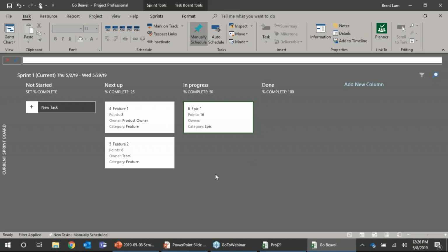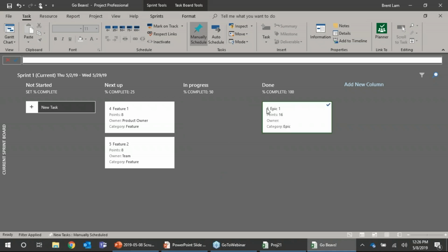I see teams that are underway that this is actually an issue. They didn't get together as a team and decide what is going to be that definition of done. Depending on the team member you ask, they may have a completely different definition than each other. Say the development lead may think, oh, after I've done my development and I've done my unit testing, we're done, right? Well, to deploy to production, we all know that most enterprises, you're going to want to do some sort of user acceptance testing or whatnot before it's production ready. So that's just something to think about.